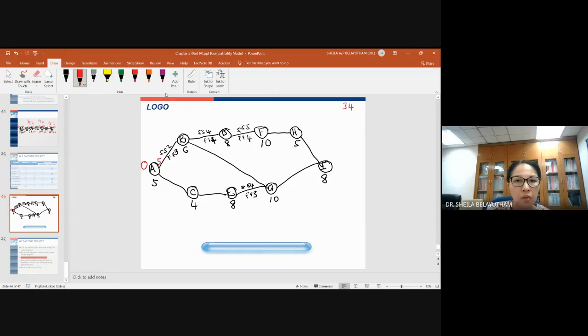So that we do not need to wait for A to complete the entire section before B comes in. It will take a longer period of time. So this relationship happens when you want them in tandem, in parallel but slightly later, so that activity A could be completed a portion of it. With two relationships, you will need to evaluate both so that there are no